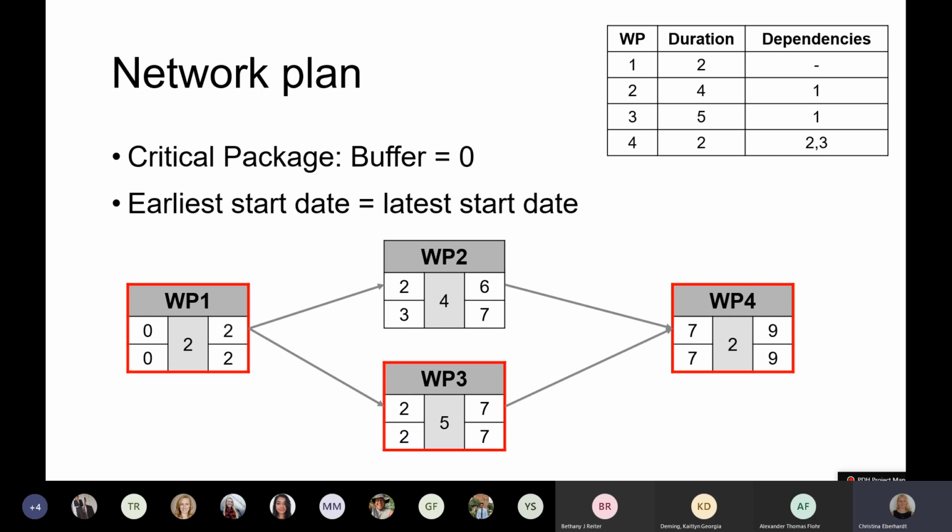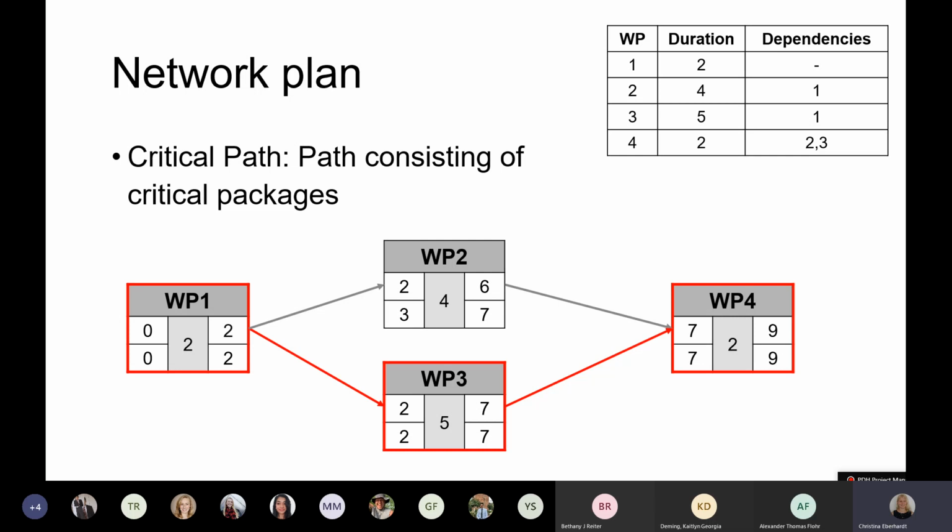In any project, we want as few critical packages as possible because a path of critical packages will form a critical path. Whenever we have a network plan, we want to determine those paths because those are the project steps that are the most important for the project, because if those get delayed, the final deadline will pretty much hit the deadline. And in those cases, there are multiple ways to change those critical paths.